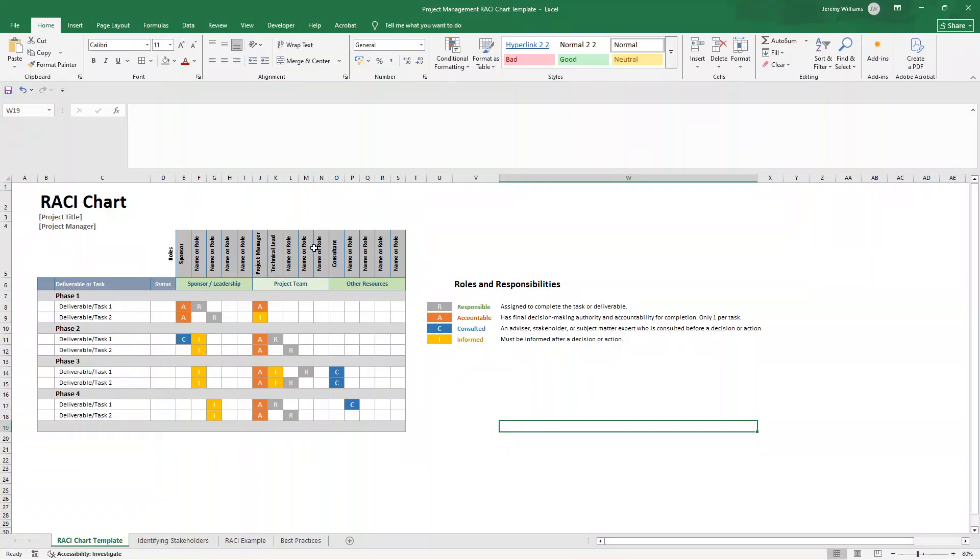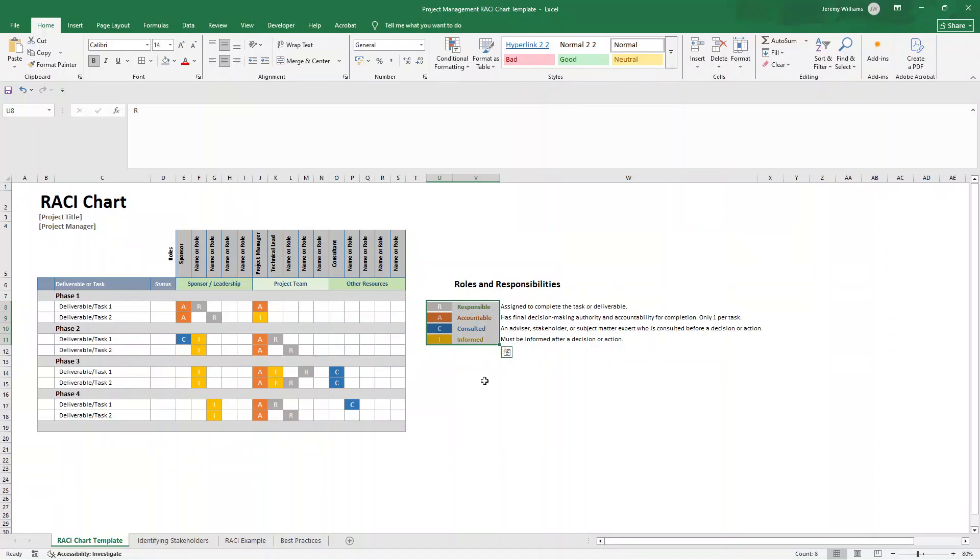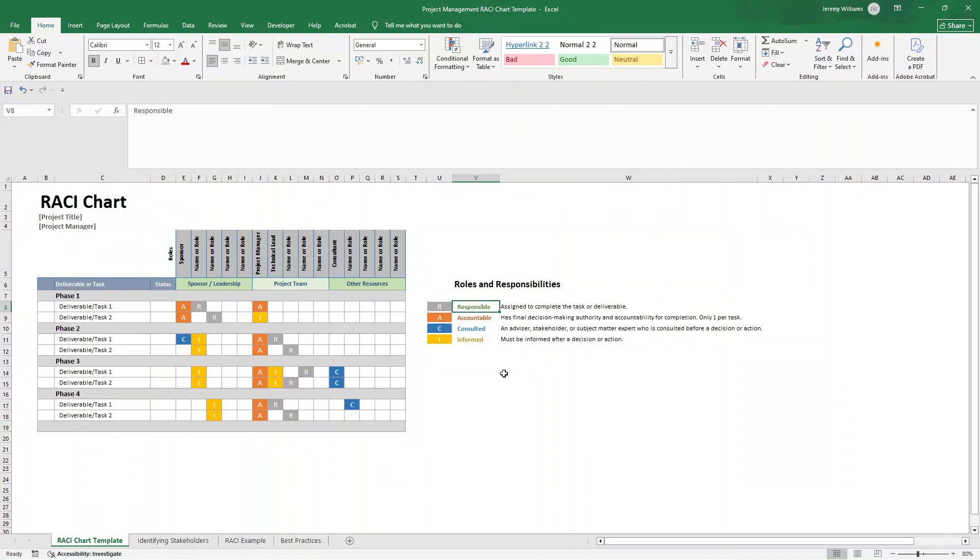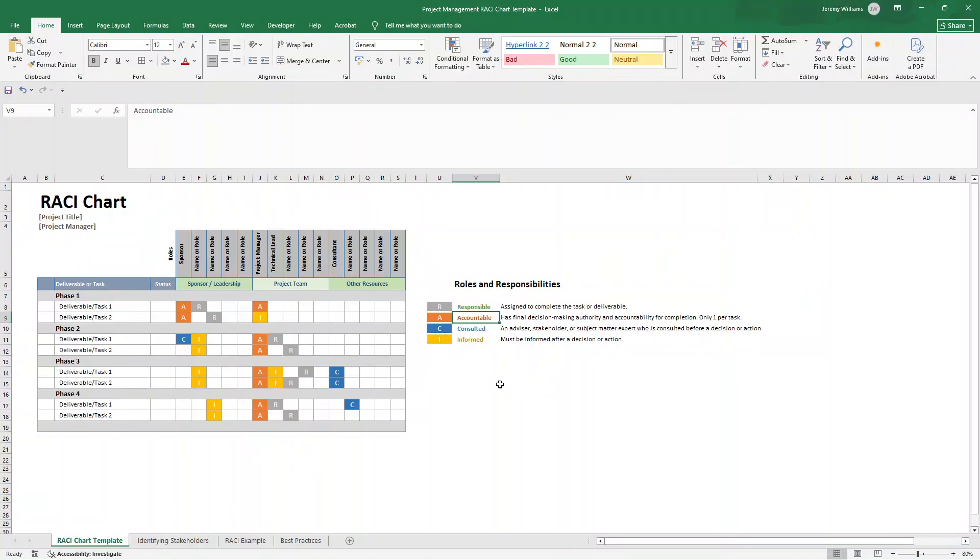So RACI is an acronym, and you can break it down as follows. R stands for responsible. These are the individuals and people who actually perform the work. They are the task executors. You can have multiple people responsible for one task. Next, we have accountable. This is the person who owns the outcome and has decision-making authority. They will approve the work and answer for the results. This is really important. Only one person should be accountable per task to avoid confusion about who's ultimately in charge.